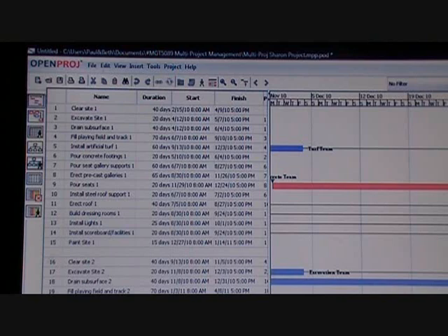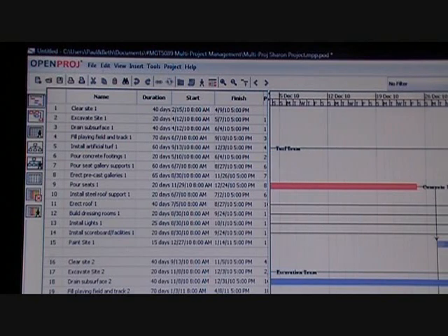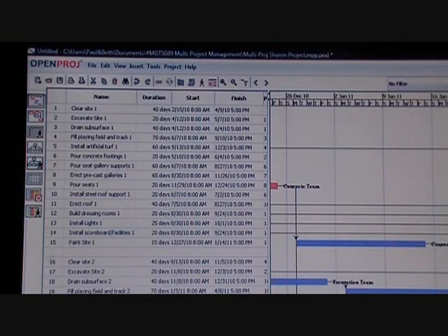As a result, the heavy machinery and the excavation and concrete teams are always busy on one project after another. And by putting these on the same project plan, we can see how the resources are utilized and how the linkages are identified across multiple projects.